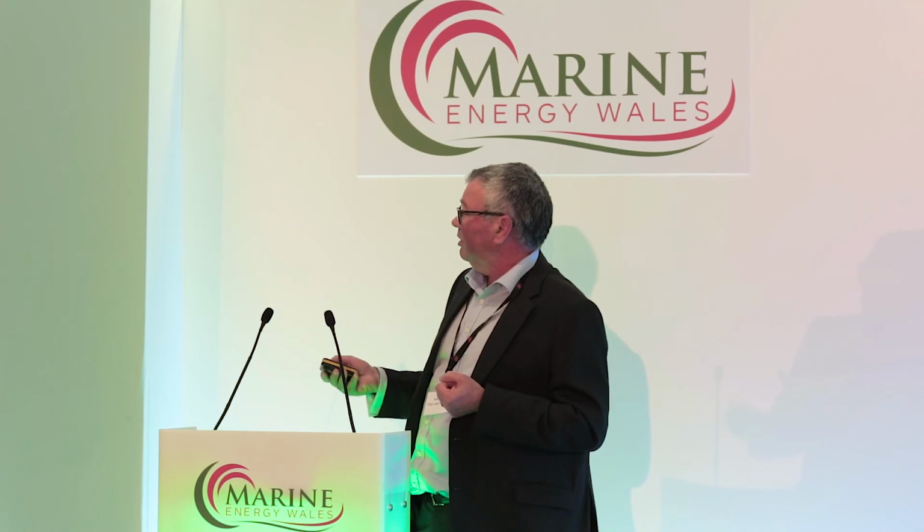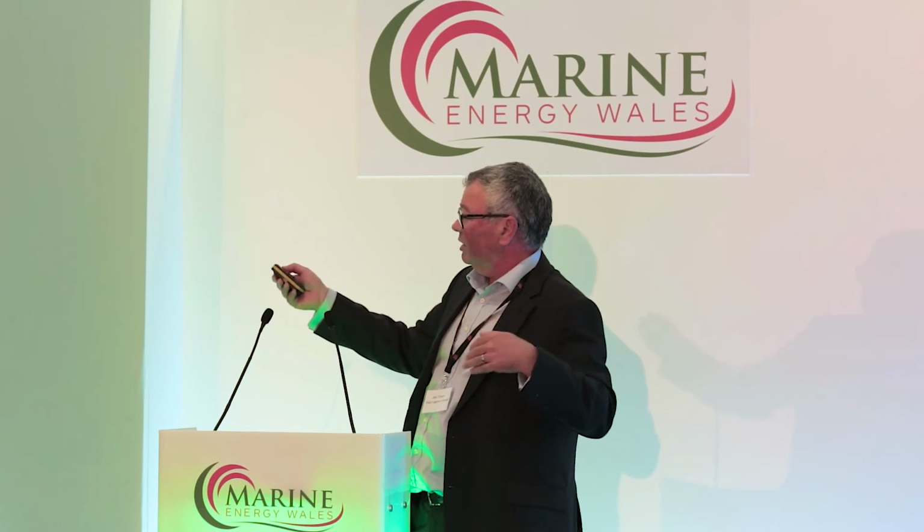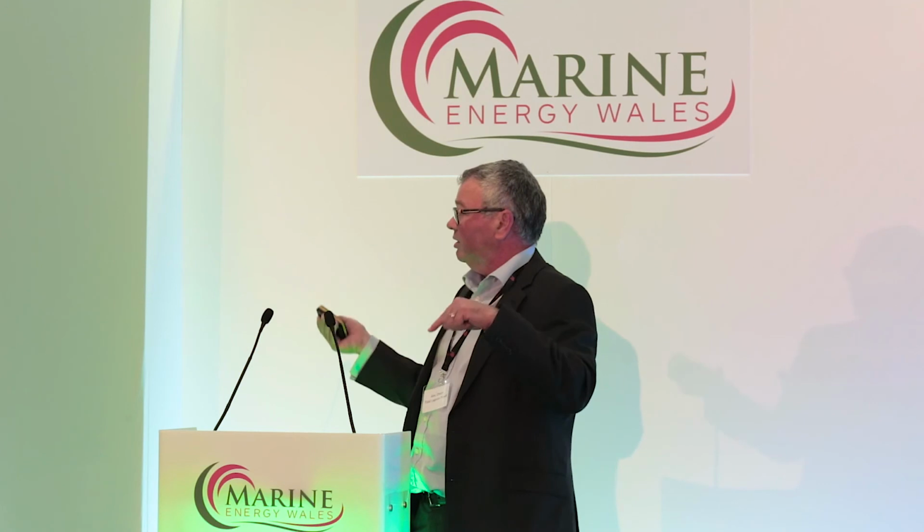Now once you've got that, to allow us to take that cofferdam away and get water through for the wet commissioning, we're going to employ what's called a limpet cofferdam, which looks like that. It's those blue things over there. It's like a limpet. It sticks on the outside of where the draft tube is, stops the water getting in. So the civil guys can start doing the scour protection and removal of the cofferdam on the outside, while the turbine guys are still installing the turbine on the inside behind these stop logs. They're quite used to doing it.